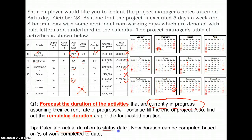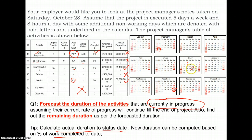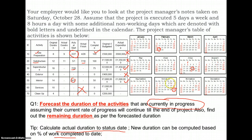For the activities in progress, we have to calculate the actual duration to the status date. The new duration can be computed based on the percentage of work complete to date. Taking the superstructure activity as an example — it started on 20th of July. Counting the number of weeks that have elapsed on the calendar: one, two, three, four, five, six, seven, eight, nine, ten, eleven, twelve, thirteen, fourteen weeks, and almost one day. Taking into account a holiday, it works out to roughly 14 weeks elapsed.